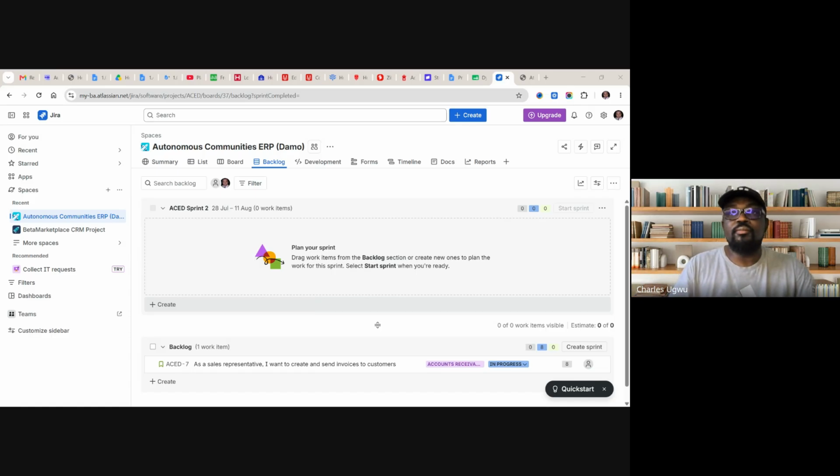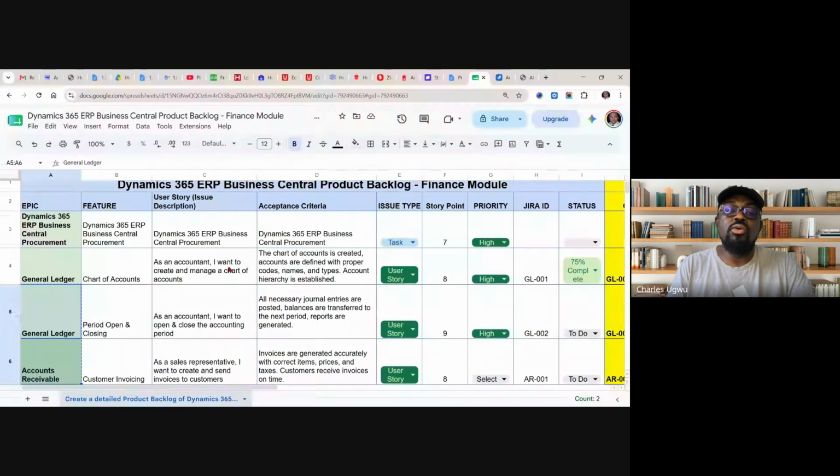So for instance, if you finish sprint 1 on this Friday, the next Monday we are starting sprint 2. And whatever you have here on the backlog is what will start. As you can see, this is the leftover. So by then, we must have moved in some more work from here. And yeah, that is it.